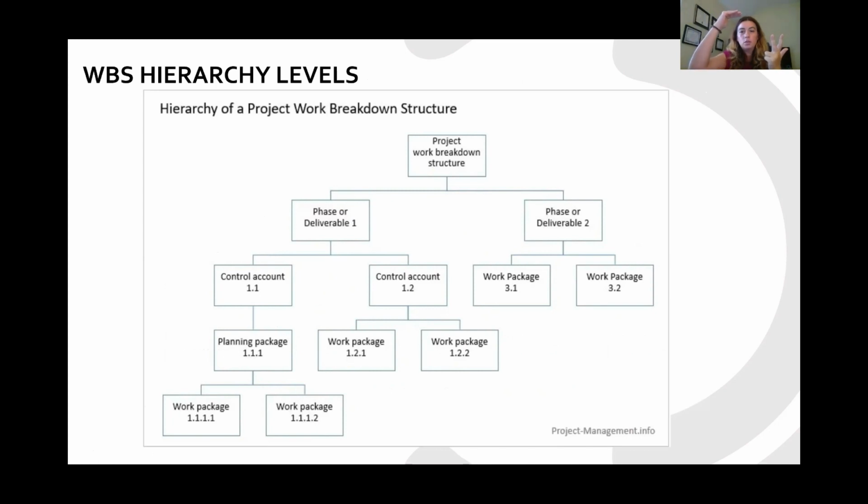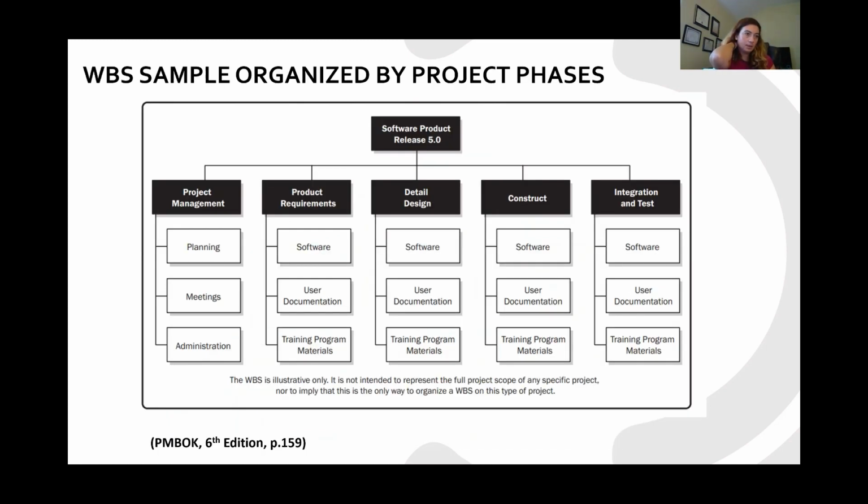This is the definition of the work breakdown structure. I define deliverables, then I go to the next level, I define the control account, and then I go to the next level and I define my work packages. I don't want you to go farther than that, but you may ask how you are going to write this in a paper.